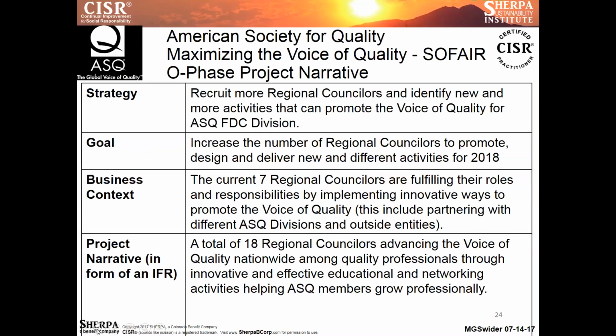Another tool that we can use in the O phase is the project narrative. You will see that using the project narrative, not only do you include at the end the ideal final resolution, but you also take time to identify the strategy, the goal, and the business context. For those who are related with a charter, they may know that these pieces of information will become crucial when we design the charter later in the process.